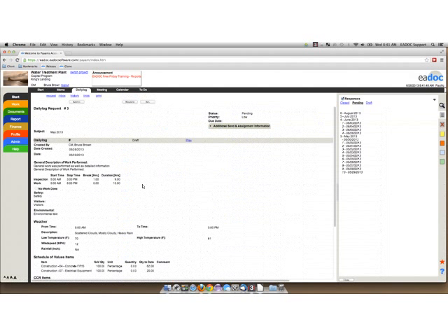Another question was, is it possible to have multiple start and stop times for inspection and work? That's not possible. You only get the one field right now as long as you're not using activity details. That may be a reason why you would want to track activity details, because you could have maybe 2 different shifts a day, and you would track those 2 shifts, each one with an activity, for example, or 3 shifts a day perhaps. And then each shift would have its own activity details.